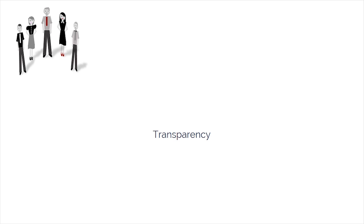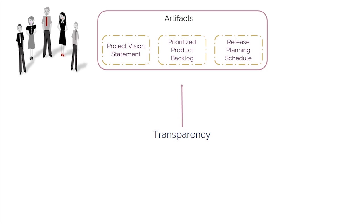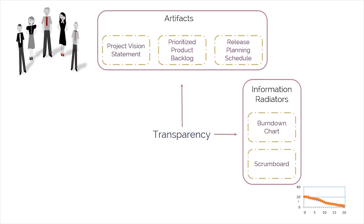In Scrum, transparency is provided by openly sharing the project vision statement, which can be viewed by all stakeholders and the Scrum team. The Prioritized Product Backlog with user stories can be viewed by everyone both inside and outside the team. The Release Planning Schedule may be coordinated across multiple Scrum teams.